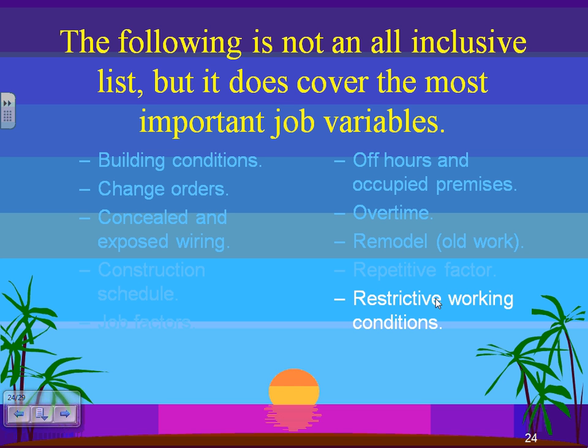But look at that. If I have 3 to 5 repeating things, I can reduce my labor unit by 15%. Who cares about reducing? You can get the job. The ultimate solution is to get the job. If I am doing the same thing over and over 16 times or more, I become proficient in doing it. I can cut my labor by almost half. Do you see that?